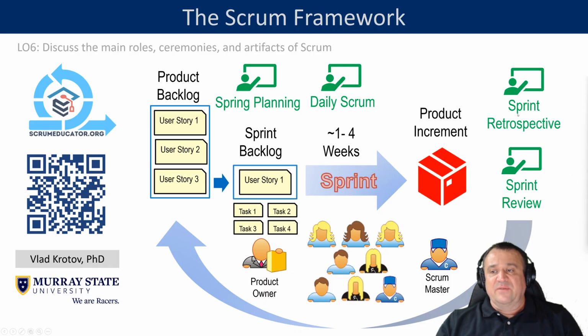And once in a while, you have the so-called sprint retrospective, where you reflect on the things that went well or didn't go well, and you adjust your Scrum work. Now, another important ceremony is the so-called daily Scrum. Daily Scrums are short, meaning around 15 minutes, stand-up meetings that happen every day, where team members answer the